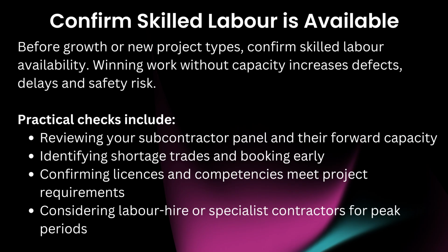Confirm skilled labour is available. Before growth or new project types, confirm skilled labour availability. Winning work without capacity increases defects, delays, and safety risk.